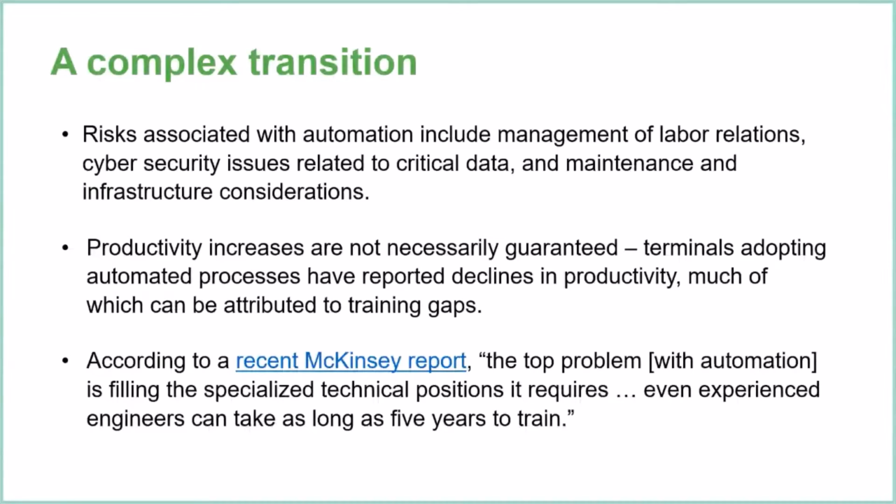It was their responsibility, if they did not have in-house the software systems such as TOS and ECS, to subcontract to others in the industry, but the contract would be with the one supplier, and then they would subcontract.